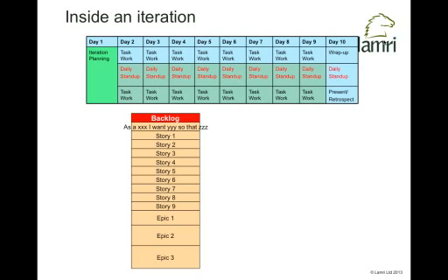What we mean by those is that they're still stories, but we recognise they're placeholders because they're quite complex things. For example, one might be user can post her CV onto the jobs website. You think, yeah, that's a story. Then you dig in a bit deeper and realise that actually it's an epic, because the CV can include an education, a job history, the objectives, desired salary, etc.